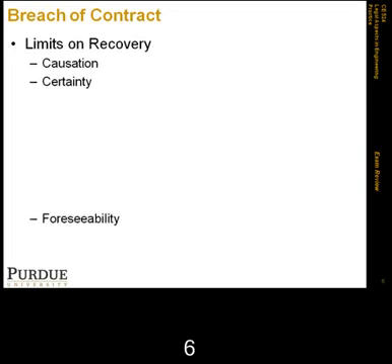And then the third thing is how foreseeable were those losses. The idea is: were the losses caused by something that was very improbable, or a combination of other large losses that led to this significant loss? Or could they have been reasonably foreseen by the party that caused the breach? So if they were not really foreseeable, it may be hard for us to ask them for relief, because they didn't know that they would be able to cause you that much damage.